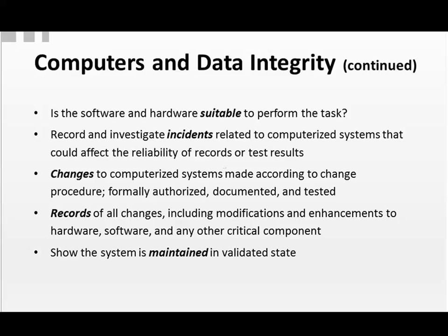Any modifications to the system, enhancements, any kind of patch or upgrade, update, change in functionality, anything like that should be evaluated in terms of what's the risk of this change having an impact on the functionality of the system. So when you are evaluating your change, you want to make sure you've taken into account the potential risk, that you've accommodated that using some good mitigation through testing, and that it's all documented.